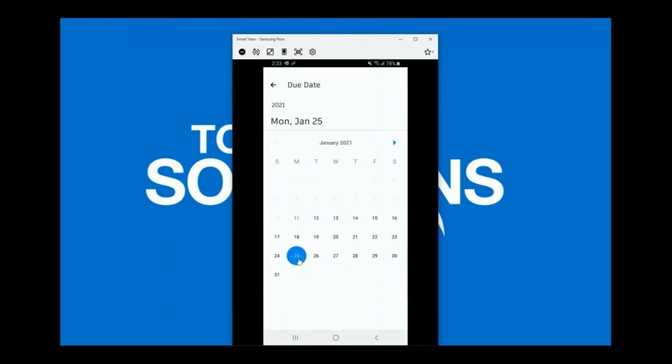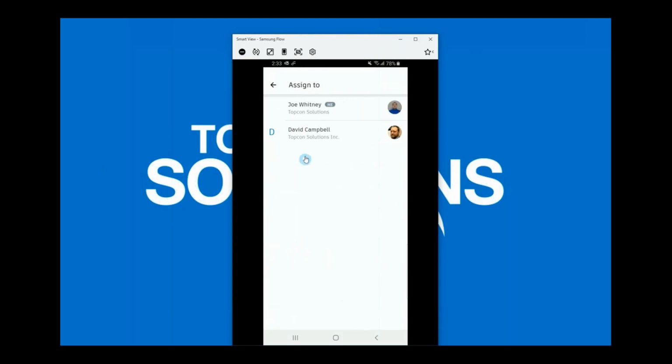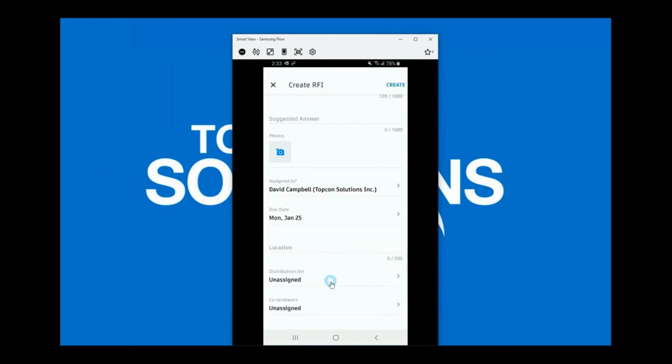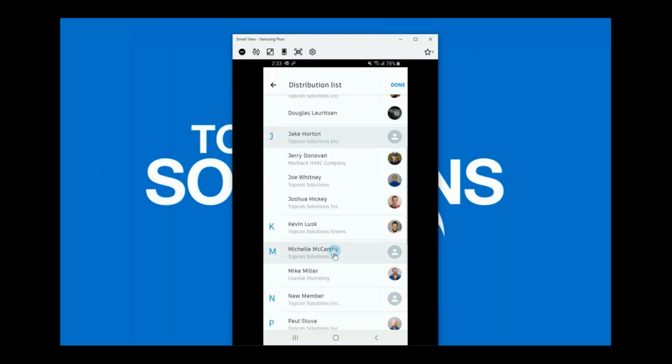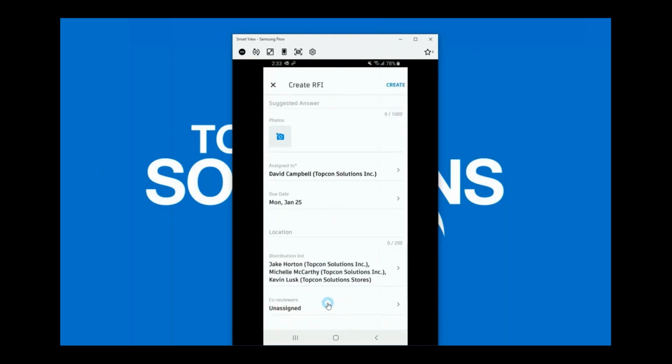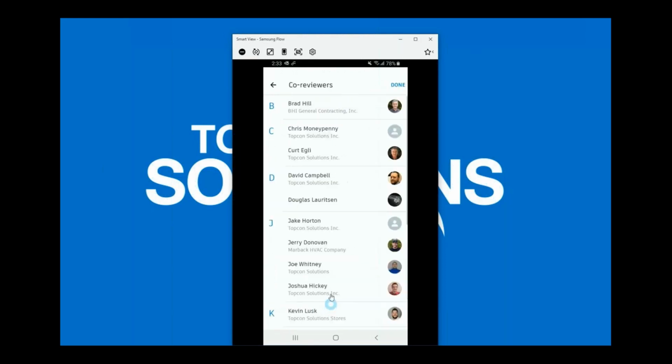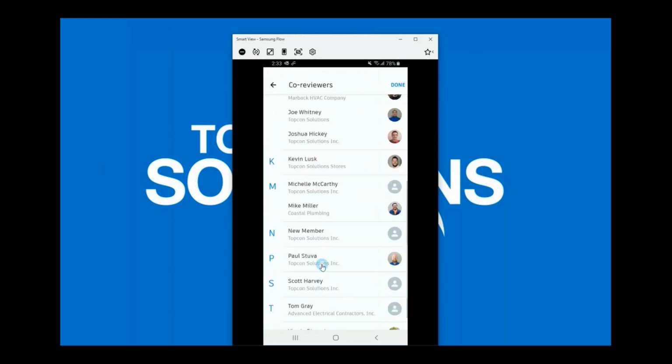Oh yeah, yeah. But this is an important component, right? We talked about RFIs, and we'll dive a little bit more into this as we talk about the build component. But really, what we're able to do is do our punch walks in a real-time fashion instead of waiting to schedule somebody back on site and handle all this stuff. It's essentially notifying whoever we assign it to right then and there.